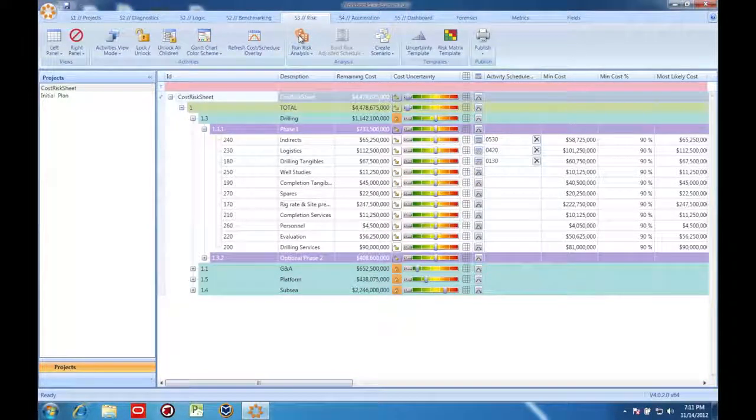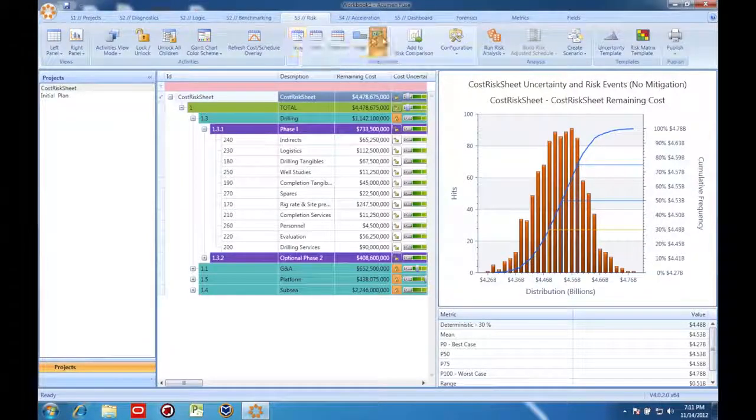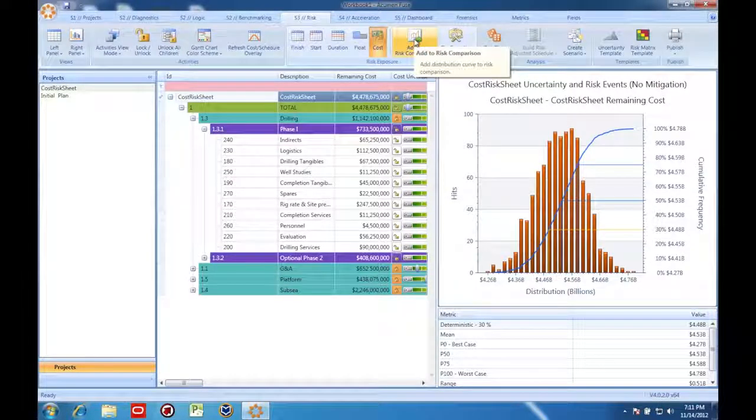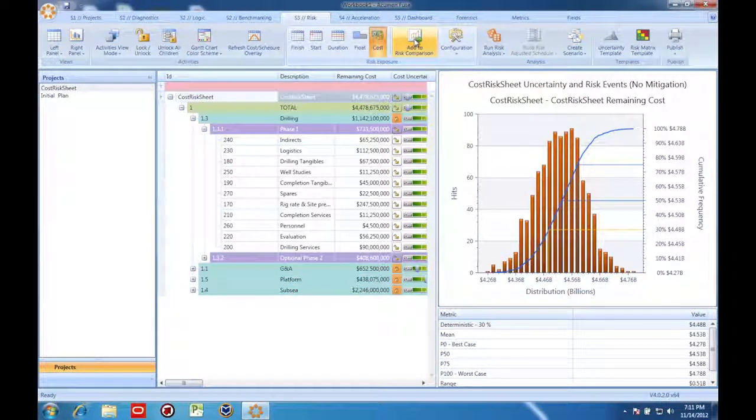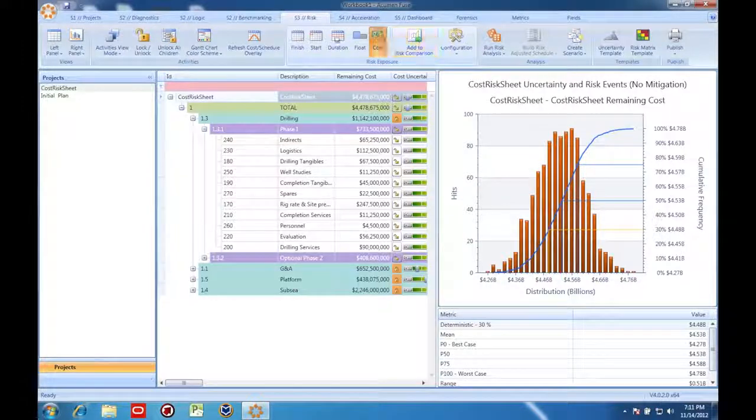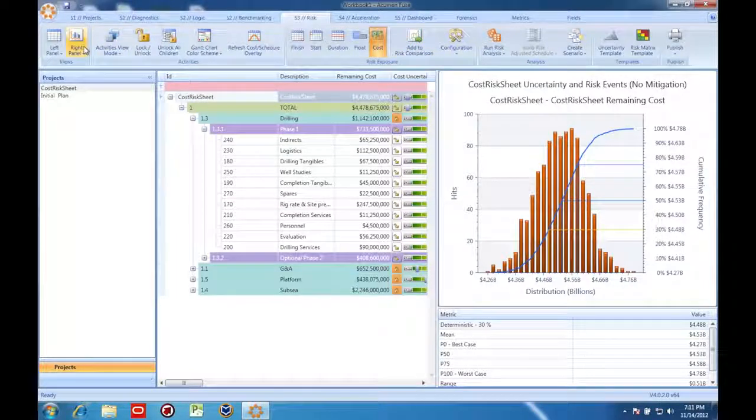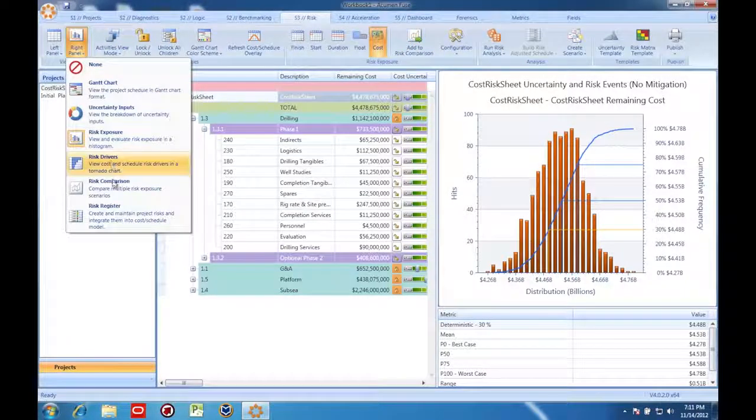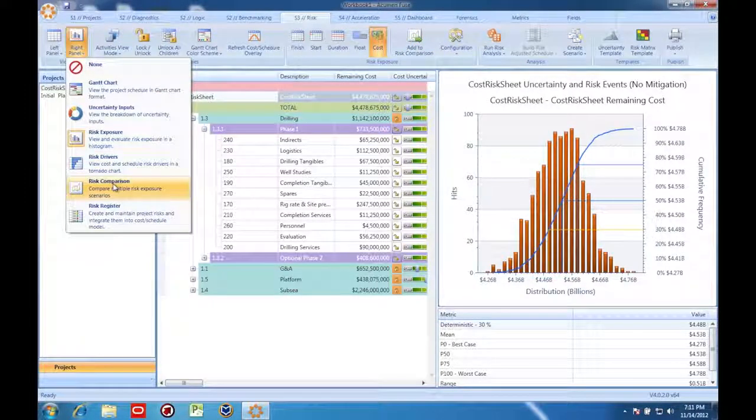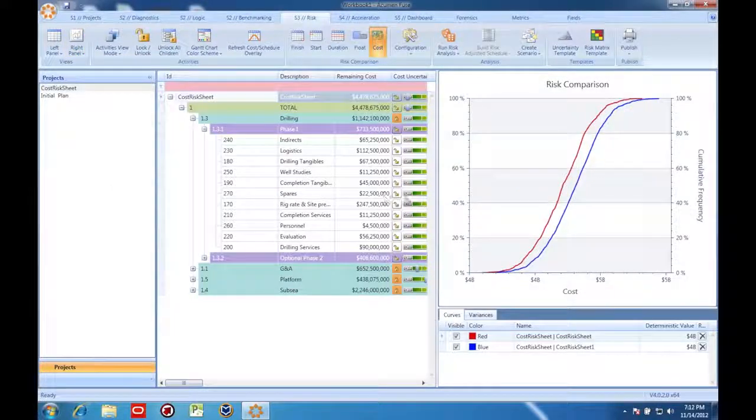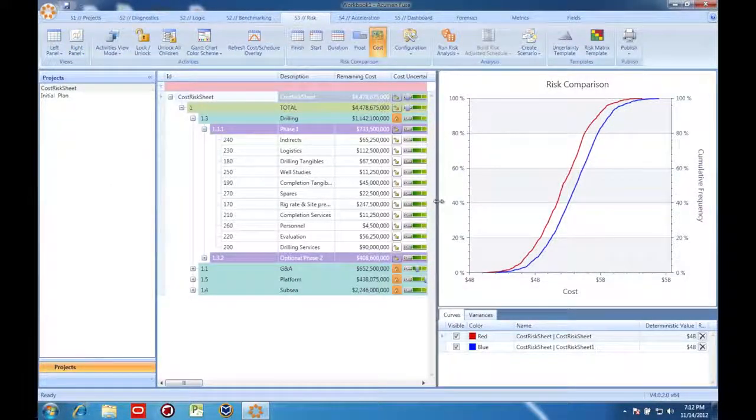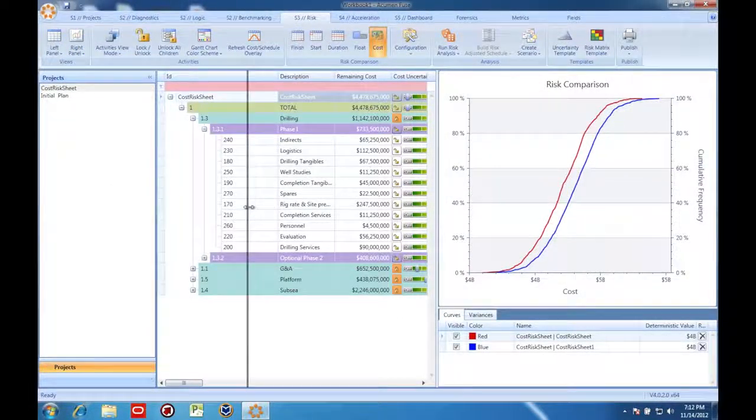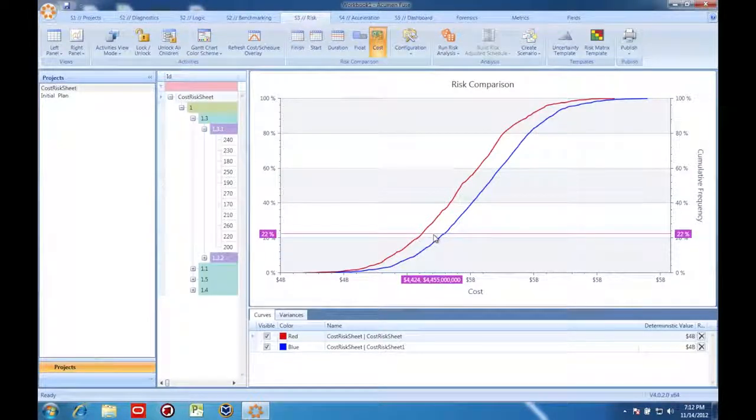With the simulation run, I'm going to save a second copy of the data by clicking here. Since I've recorded a view before linking cost and schedule, I can go to this comparison screen to compare the snapshots and see exactly how much the schedule integration has impacted my cost risk.